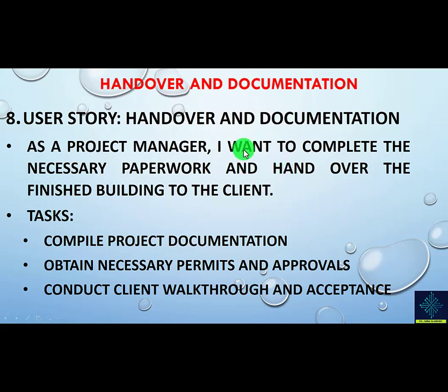Another user story is related to handover and documentation. This time it comes from the project manager. As project manager, I want to complete the necessary paperwork and hand over the finished building to the client. What tasks might be involved? You might have a task related to compiling project documentation, obtaining necessary permits and approvals, conducting client walkthrough and acceptance.